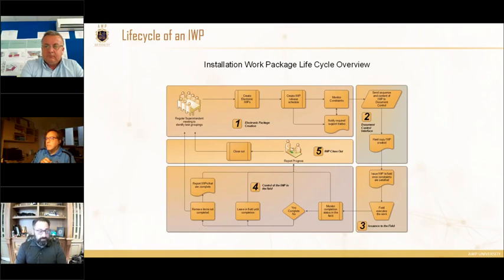For the first several years of my career, as Fernando mentioned, I didn't know I was doing AWP or last planner. I was just doing planning methodologies as a previous student of last planner, with a few nuances that became work-phase planning. Bringing the craft in to identify what they want in those IWPs, a work-phase planner goes away and does all the heavy lifting, the magic behind the curtains, and comes back to say, is this your plan?